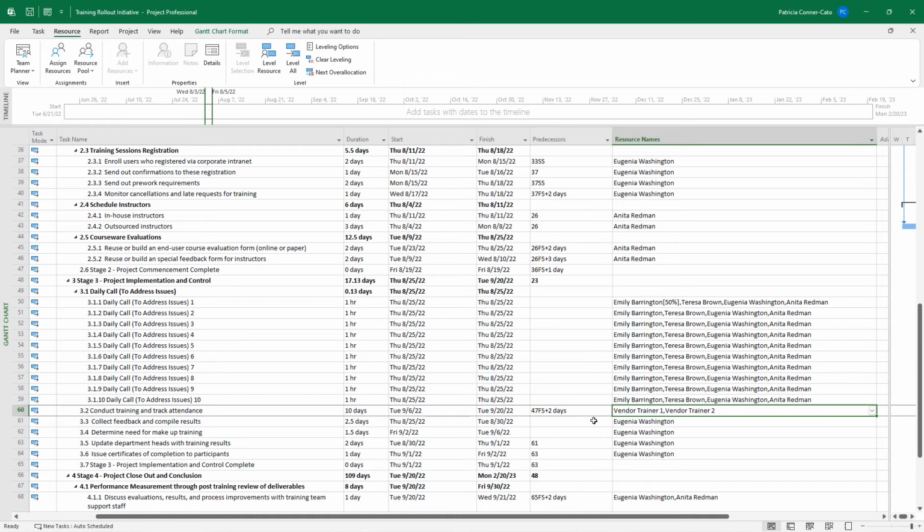And that's really how you optimize your project. You just make sure that your task list is correct in terms of relationships. If there's any way of truncating the project by using start to start relationship type, you would want to do that, or by adding lead time to tasks if necessary. Making sure your final resource assignments are done and any over allocations are resolved. And once you do all of that, save your project.